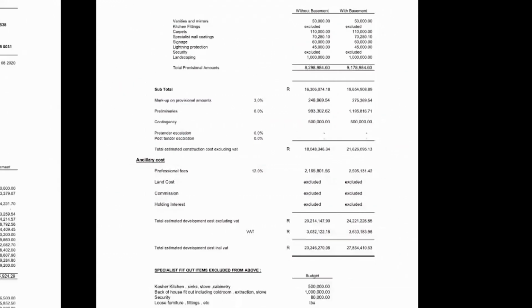So when we presented this to our client, and all this was happening before we presented to our client, we didn't go to our client and say it's going to cost 39 million rand and freak them out. We sat down with our QS because we know that this could be an issue, and worked with the QS to reduce the costs up front. So when we went to the client, we said, this job could cost 25 million rand, and they were like, fantastic, let's go.